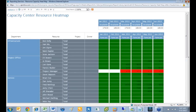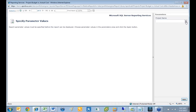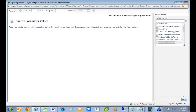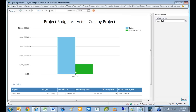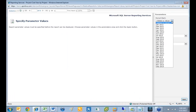So that's one resourcing report. Let's look at a few project reports — some cost reports. A report we could look at is project budget versus actual costs. I'll click that, select the Xbox DVD project, and hit apply. I can quickly see my budget versus my actual costs — I'm way under, which could be a problem or a good thing, or maybe the project's not finished yet. You can see the details below if you want more than just the graphical view. There's another useful report for looking at different types of costs called 'project cost view by project.' I'll launch that, pick a start period of January and end period of December so we can look at a full year of costs.